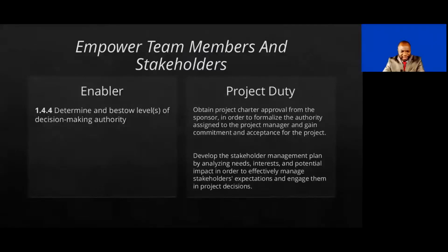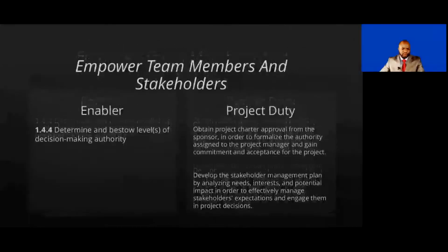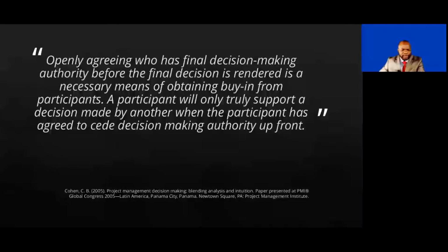I want to make it very clear that is a stakeholder engagement plan. All of these project duties have been crafted from PMI documentation where that term was used, but it is called a stakeholder engagement plan, just to be extremely sure that you are aware of that. And openly agreeing who has final decision-making authority before the final decision is rendered is a necessary means of obtaining buy-in from participants. A participant will only truly support a decision made by another when the participant has agreed to cede decision-making authority up front.